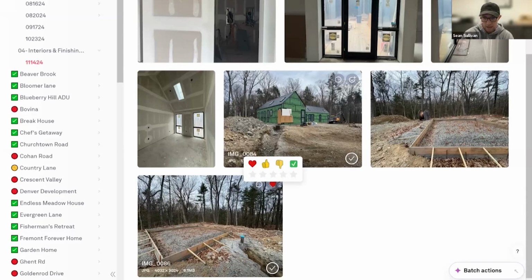So I think that's like the one highlight I would say on this project, just how quickly we're moving through things. It's also nice working with clients who are very decisive and are able to work through decisions with us as the design team and then with the general contractor. So we meet once a week, every single week, always have an agenda and always have some type of decision point that's being made. And I think that's definitely been one really helpful thing on this project.